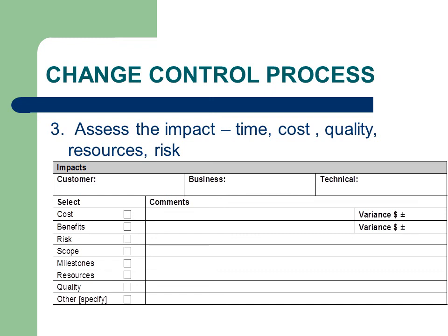Normally, the cost of implementing a change will increase as you move through the project life cycle. In the planning phase, only planning documentation may need to change, but during the execution and control phase, costly rework may be required.